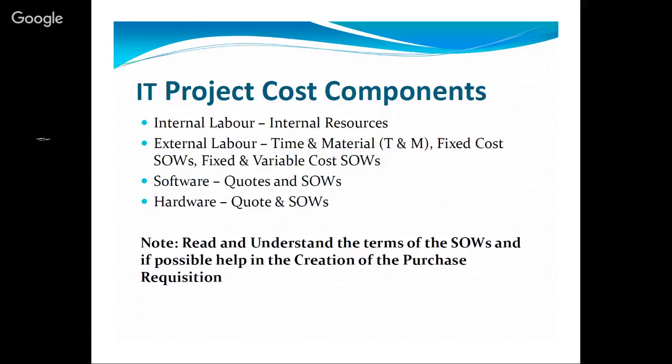It is very important, because in most cases there are legal implications, and legal issues mean financials. In this part of the world where I am, the rule of law works very well. So vendors are able to take people or companies to court when they are not satisfied with what is going on. So it is very important for any person signing a contract with a vendor to understand the terms of the sale and, if possible, help in the creation of the purchase requisition, which will eventually become the purchase order that will show how the goods and services will be delivered. That is very, very critical for financial management. Then this takes me to the next level, which is